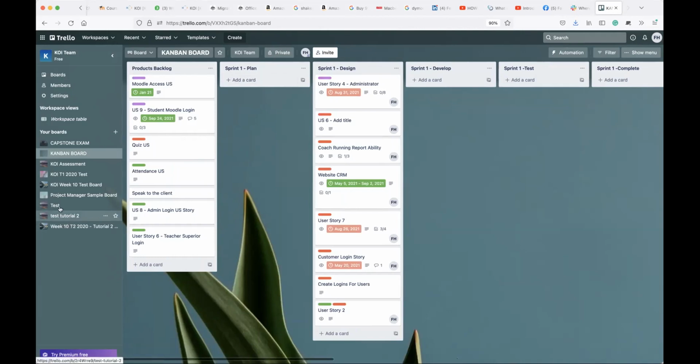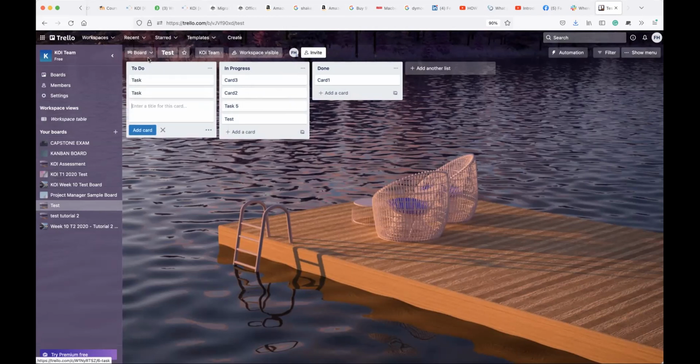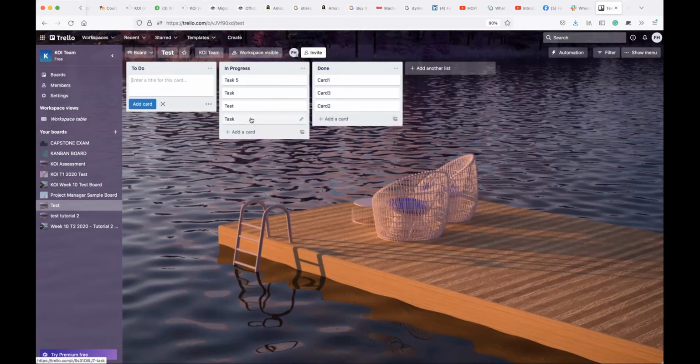In a Kanban, on the other hand, we're not. We have these stages, but they're not really repeating. We don't have 2 to 6 weeks where we get a solution, and then another 2 to 6 weeks, we get a solution, another 2 weeks. No, we don't do that. Here, you finish one, you add. You finish, you add. As soon as you finish more, you can continue working more. So it's really continuous, rather than having a cycle of 2 to 6 weeks where after every cycle, you need to get some particular solution delivered.